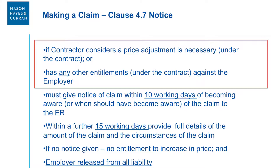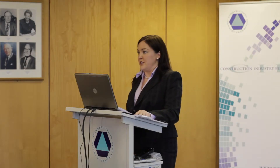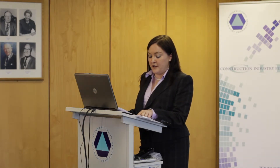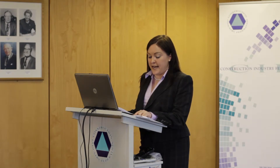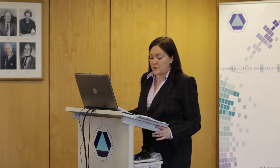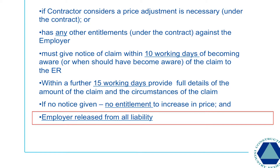If the contractor considers that under this contract there should be an adjustment of the price, or that it has any other entitlement against the employer under or in relation to this contract, the contractor must give the employer's representative notice of the claim within 10 working days of when the contractor became or should have become aware of it, and full details of the circumstances and the amount claimed within a further 15 working days after giving the notice.